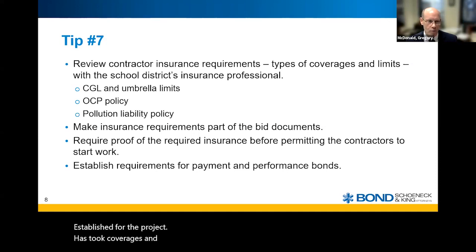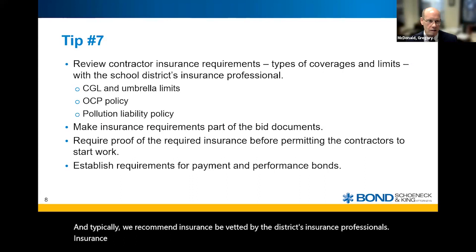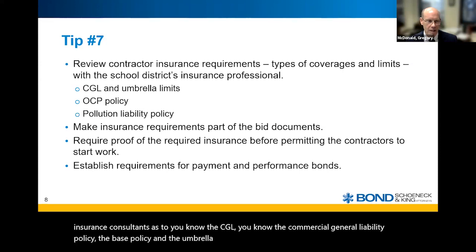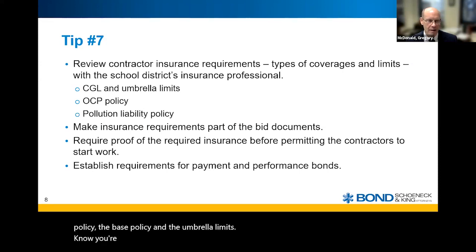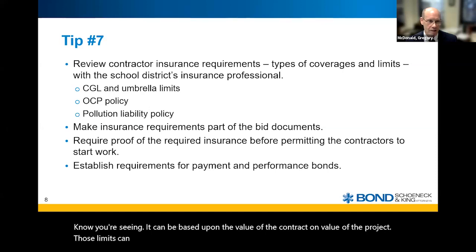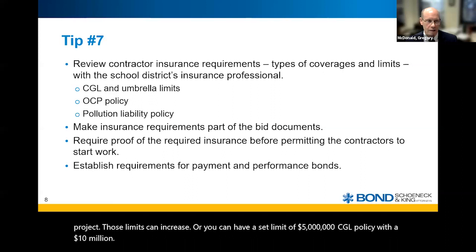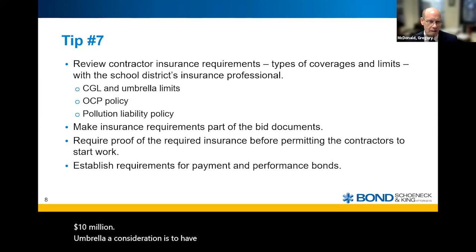And typically we recommend insurance be vetted by the district's insurance professionals, insurance consultants, as to the CGL, the commercial general liability policy, the base policy, and the umbrella limits. You're seeing, it can be based upon the value of the contract and the value of the project. Those limits can increase, or you can have a set limit of $5 million CGL policy with a $10 million umbrella. A consideration is to have an owner's contractor's protective policy.